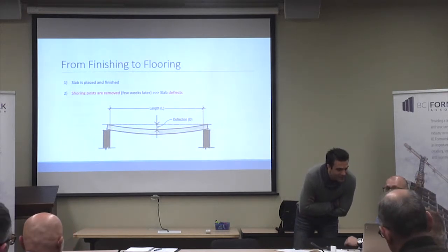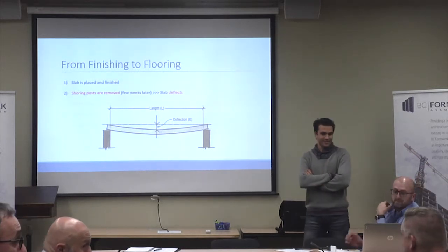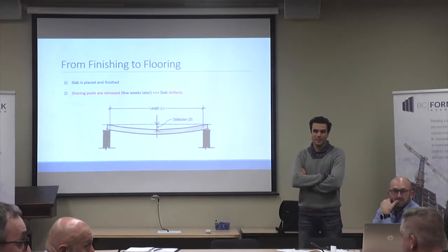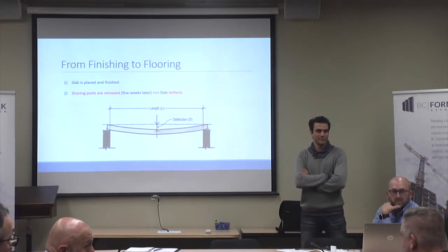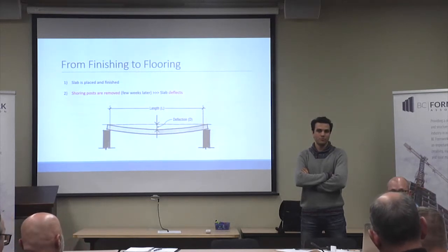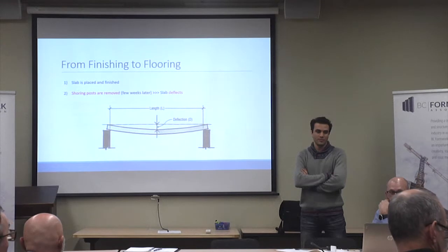No, that's true. Our thing is, we just do it the old school way that we can. Before we even drop the table, we shoot the floor, and we have the superintendent up there with us. You look through the scope, that's your benchmark. You drop the table in front of them, there's your half inch. They know. And we move on from there. Your 80% that you're talking about, and they push you on schedule, it's their concrete.